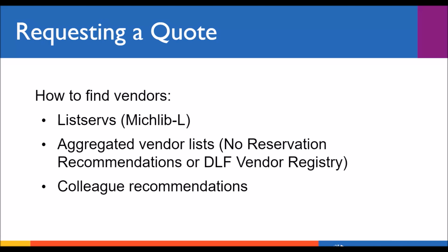Now, depending on the size of your project, you might not need something as formal as an RFP, and instead may only reach out to a few potential vendors with some of the basic information. At a minimum, you should provide the format to be digitized, the number of items or amount of material to be digitized, your desired deliverables, including any technical specifications that you have, a timeline or any time constraints that you're working with, as well as any other pertinent information.